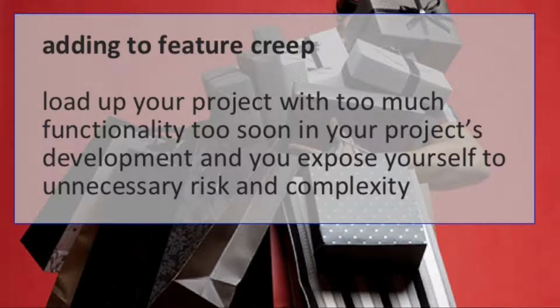What you really should think about is, in the state that you're in now, what are the things that you really need? What's driving your content? And I always tell people to go back to your content. Go back to your original plan when you first kicked off the project, when you did a content audit. Don't think about the features on a site. Don't think about how they're laid out or how they're presented. Just think about what communication goal you have, what it is that you're trying to communicate to your users. What's your message, how are you organizing your content? And then think about layout later, think about design later. Those are always later phases.